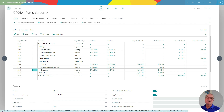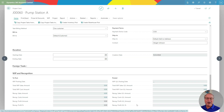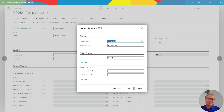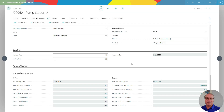The project is complete. I need to do some additional billing. Let's take a look at calculating the work in progress — I can do this at any time in the life of the project. At the bottom of the project page is a work in process summary. I can calculate it, recognize it, and then post it to the general ledger. Right now I've done no calculation. All I need to do is go up to WIP and calculate the WIP. It will calculate based on the criteria I set up for this particular project. You can see the calculation right here. I can move this to the general ledger on a periodic basis — I'm going to post to the GL, and I'm done.